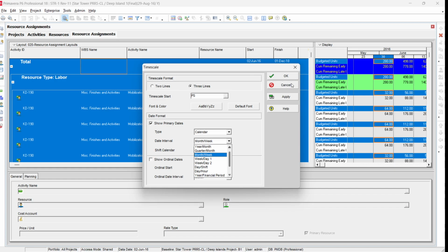If you make it daily, it will be very extensive, too much data. And monthly sometimes you need intermediate detail inside the week, inside the month. So I prefer to make it on a weekly basis. From week you can get month also. If you make it on a daily basis, it will be too much for you to handle. But if your requirement is that and your project is not that big, you can go for daily basis also. But my project is more than two and a half years long, so I select the week option.